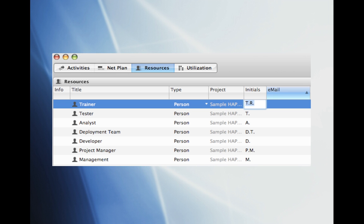Once we select the appropriate column sets we can go ahead and create the titles necessary to complete our project. Continue to insert new resources by selecting the plus button next to the search bar. You should create resources for the Analyst, Developer, Deployment Team, Project Manager, Tester, and Trainer in addition to Management. Note that I added the letter R to the initial set for Trainer to differentiate between Tester and Trainer in the initials column.